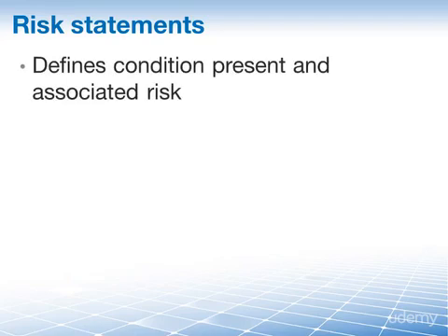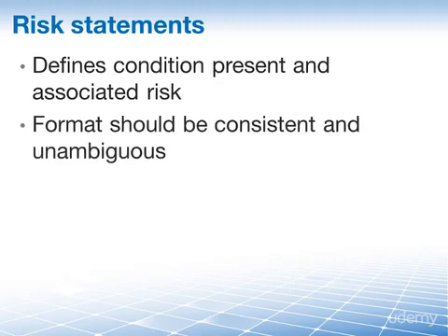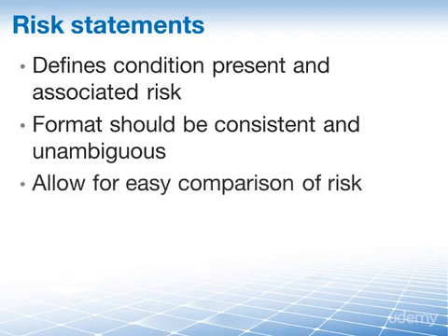A well-constructed risk statement provides a clear description of the current condition, the associated risk event, and the impact if it is indeed realized. It uses a consistent format that is unambiguous and supports effective risk analysis and response. This format enables the project team to compare a single risk and its relative impact or probability to others that we have on the project.